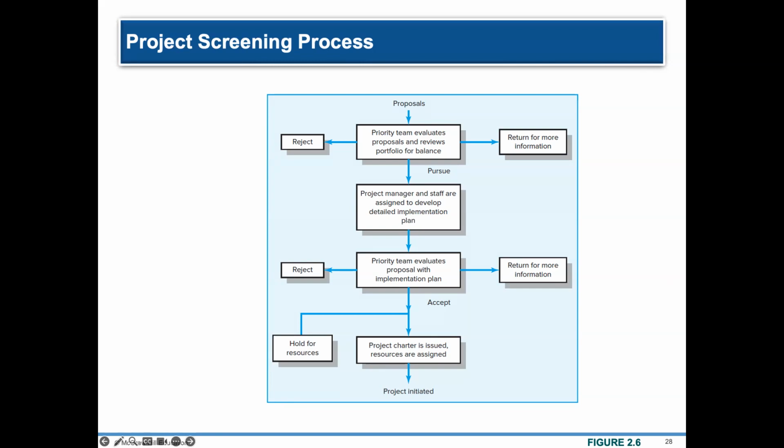Or it's not postponed, but you're actually required to start pursuing and start planning that project. When a project charter is issued and resources are assigned, you are therefore ready to start your project. So this is the whole project screening process.